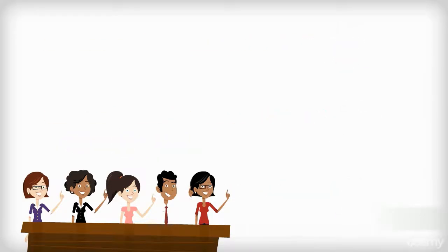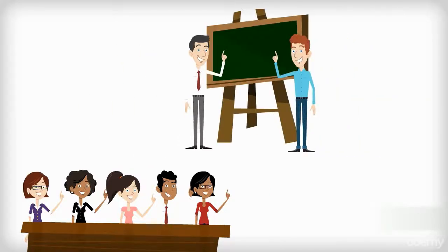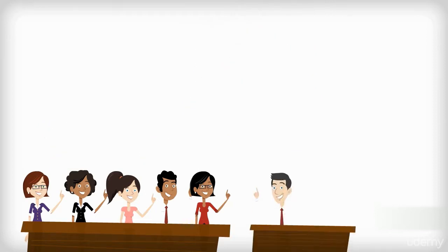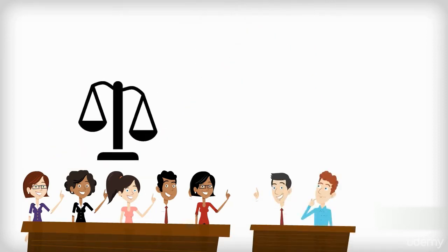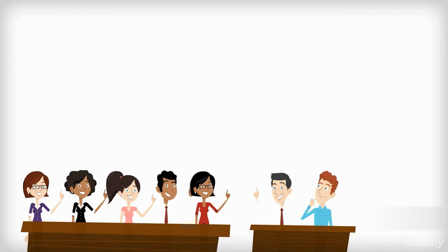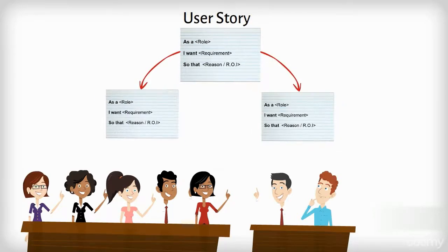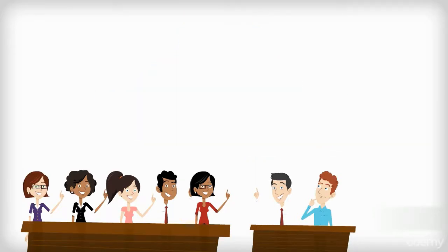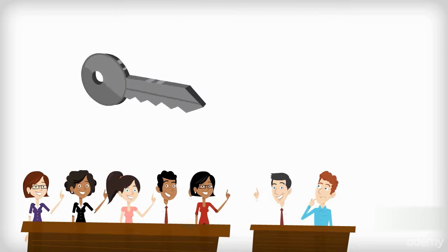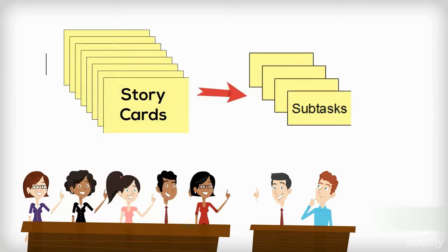From my experience, it's very important for the product owner, scrum master, and team to be together in this half of the meeting as well as the first half so the team can have questions answered quickly. In addition, the product owner will need to make trade-offs whenever the team reach their limit of work. For example, at times this limit may be half the effort of a user story. The product owner can decide whether to split stories or simply pick another smaller one. This can often be a key product decision, especially in the later sprints. Once the task breakdown is complete, the team finalizes their commitment to deliver the sprint.